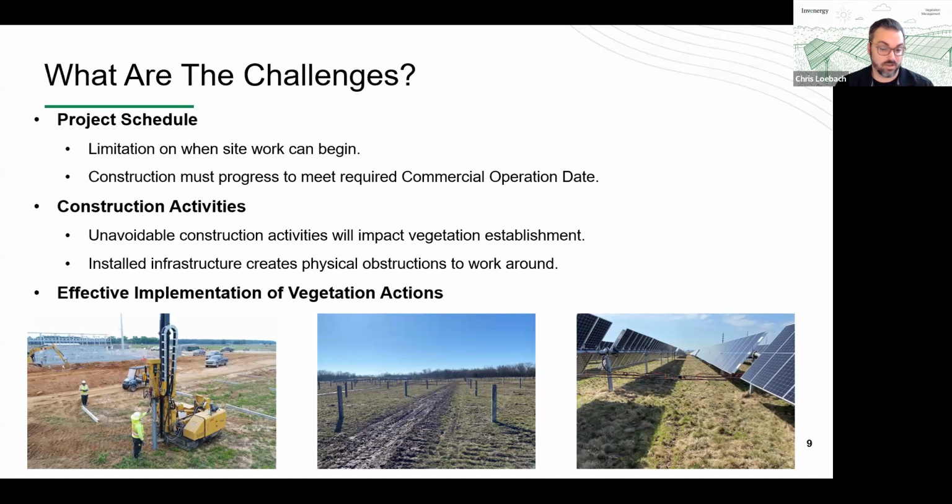One is we have to ensure we have all of the necessary regulatory approvals and permits in place, or we have to ensure that we have successfully completed our contracting effort with our off-takers. Those efforts can take time and they might not be complete until almost right before we're ready to start construction. Also, these sites have to turn on, the power has to flow by a certain date. And that date that the power has to be on, that's going to dictate your construction schedule. And things really need to keep moving forward to meet that deadline.